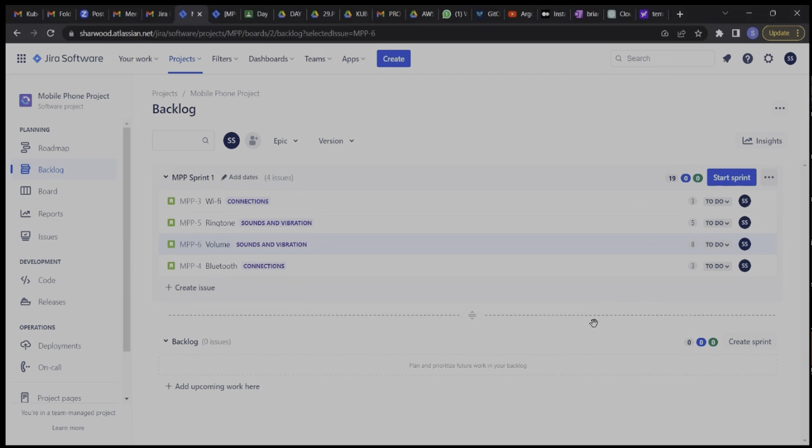Okay, you people are my team. We are a team. I said team. All right, this is what we have taken. We are assuming that this 19 story points, we have taken it according to our capacity. Remember, capacity is the availability of team members for that sprint. So let's assume that as per the number of people that will be available, we have seen that it's fair enough for us to take 19 story points. Then we are sure that we are able to finish, right?